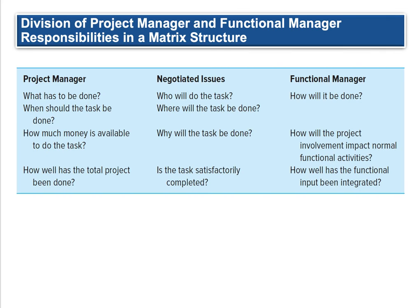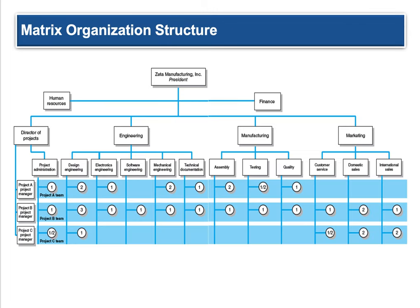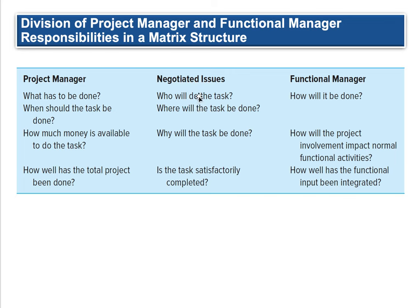Division of responsibilities between the project manager and functional manager in a matrix structure: the project manager asks what has to be done, when should it be done, how much money is available, and how well has the total project been done. Negotiated issues include who will do the tasks. The functional manager asks how it will be accomplished, where it should be done, why the task justifies spending the money, and how project involvement will impact normal functional activities. Functional managers handle the more routine organizational functions; project managers think outside the box. Where they coincide — that's the matrix. The feedback loop is: was the project satisfactory and how well did it integrate into the functional areas?